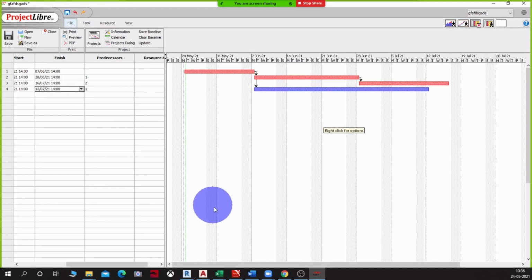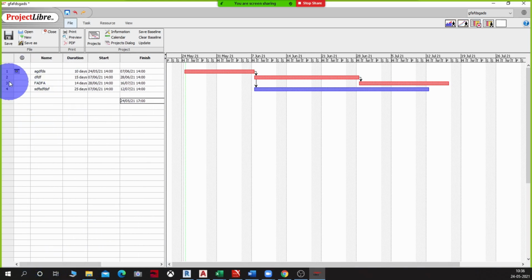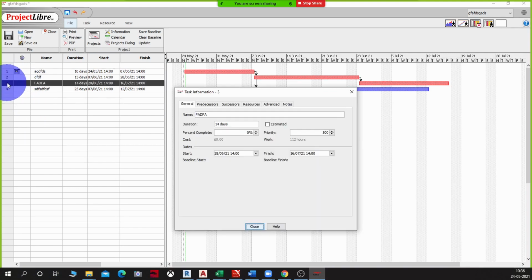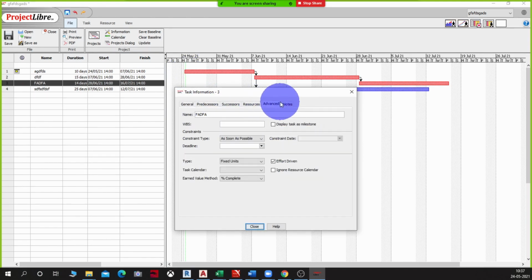Okay, and one of the reasons why these dates would go haywire would be you would have chosen a calendar unknowingly. For instance, this task would have a default calendar, right? Task calendar. If you would have unknowingly clicked on 24 or night shift or master builder, the calendar would act differently.